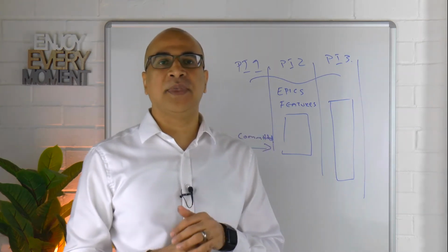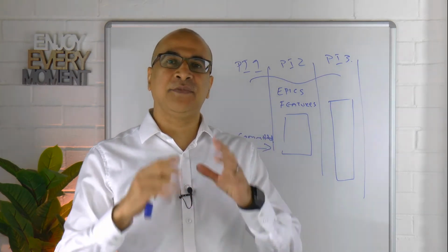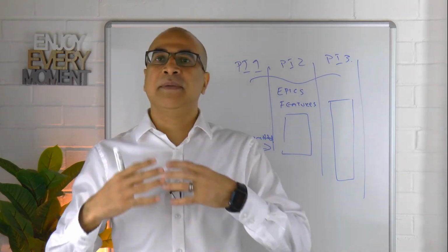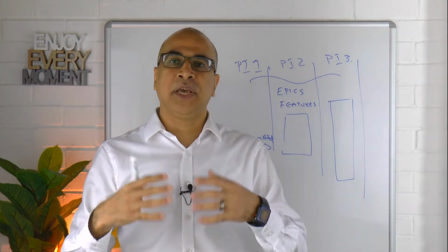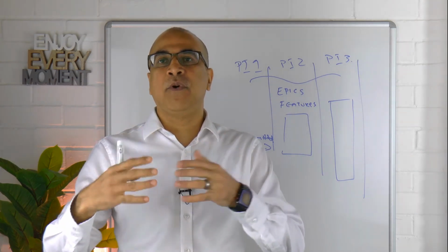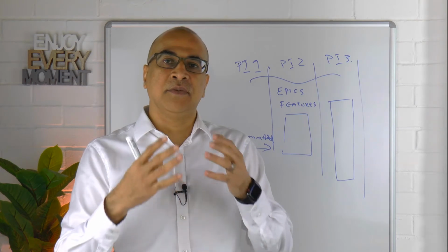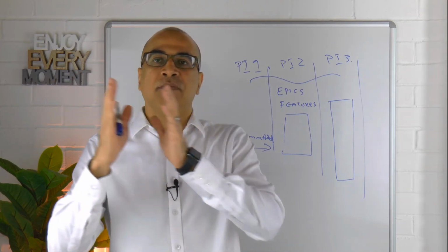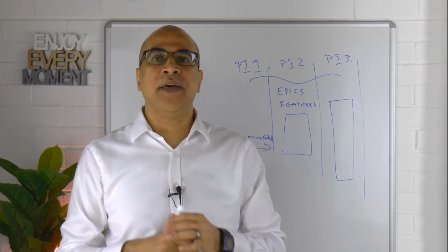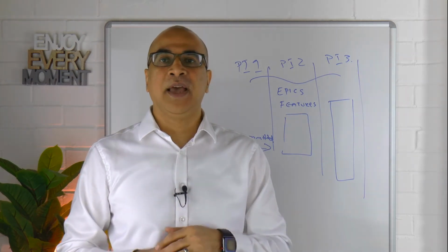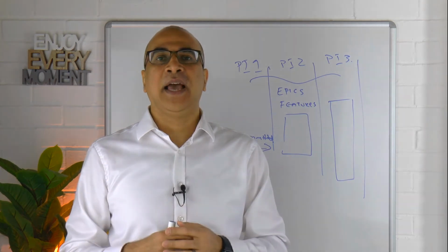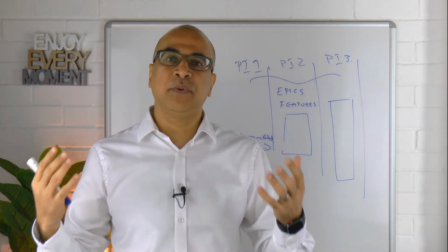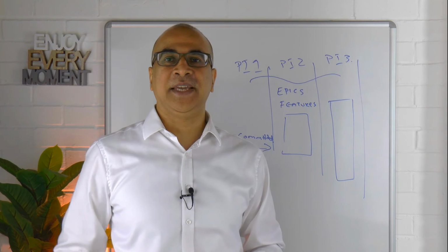Okay, fantastic. So that's what you have, a PI roadmap. Now that is very useful at the Agile release train level. I would expect this to be brought into and maintained and updated after your PI planning event, and before your next PI planning event, you'd want to be bringing this in your preparation, making sure you're preparing the right thing. You want to be keeping this up to date to see if things fall out and how that impacts later on other parts of your roadmap. So it's important to try and keep that up to date as well. But it does factor as one of the inputs into your preparation for your PI planning event. So it's very important to make sure that we have this in a good state.